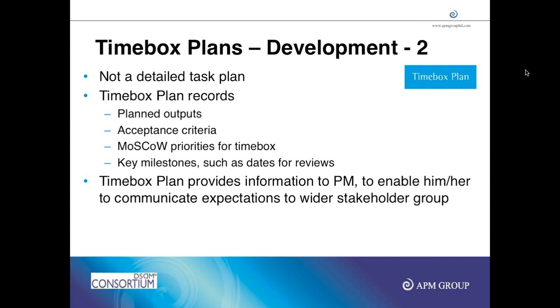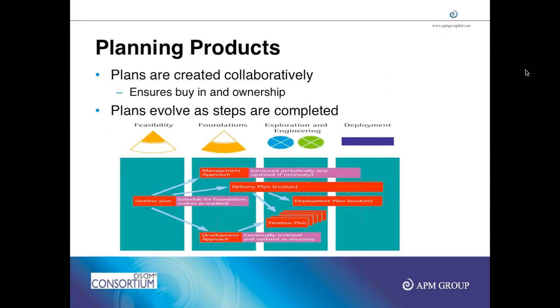Monday to Wednesday, task 1 and the person's name. Tuesday to Friday, task 2 and the person's name. So we have all the plan visible. Each day when we meet near that whiteboard, we see, okay, today is Wednesday, what tasks should have been worked on? Which tasks have been started, which couldn't start, which are in progress, which are completed. You can just go and tick it. You can use those charts to show what has been done so far. It's all done by the teams as part of daily stand-ups.